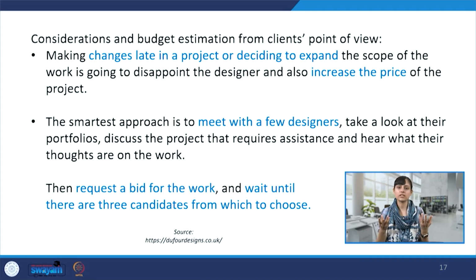And the smartest way is to meet a few designers, see their portfolios, discuss your project, see their design briefs, and then after hearing their thoughts, request a bid, and wait until there are three candidates from which you could choose. So it is a smart and very, very effective method of choosing a designer and then computing the cost of the project.